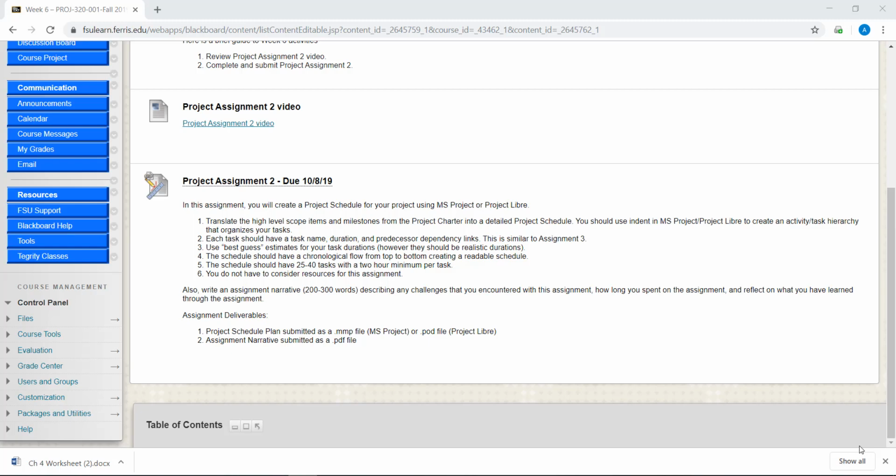In this video, I would like to take a few minutes to review this week's assignment, creating your course project schedule. You should begin by reviewing the provided project charter for your project. Then you will start with the high-level scope items or milestones and break them down into individual project tasks. For each task, you'll need to provide a task name that describes the action that needs to be completed, the task duration, and any predecessor relationships that exist for that task.